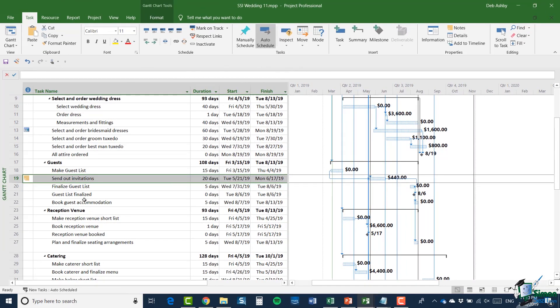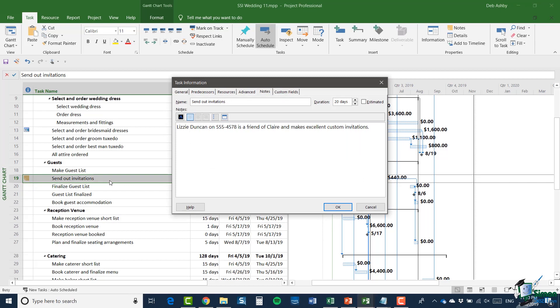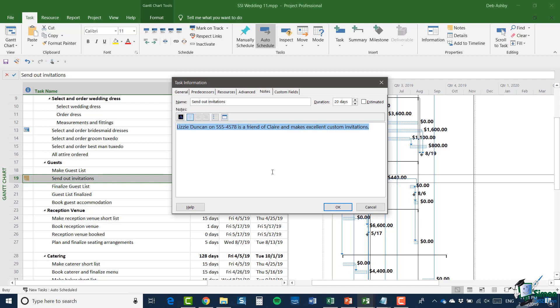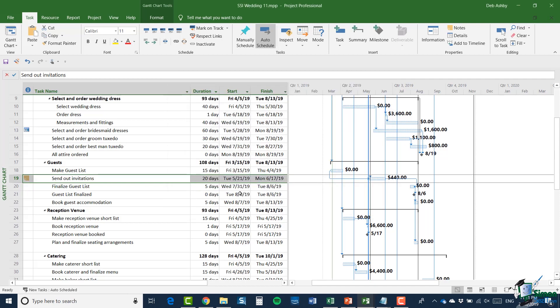Now, if I see that a task has a note and I want to open it up, obviously, if I just double click on the task and go to the notes tab, I can see that note. And if you're wondering how you delete a note, so maybe you make a mistake or you don't need that note anymore, there is no delete note button per se. All you need to do is highlight the text, hit the delete key to remove it and the note will disappear.